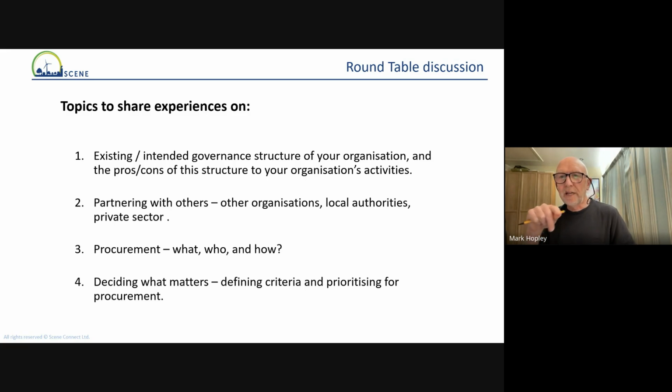There is a common denominator about the importance of doing due diligence on using contractors, even on small scale projects like community buildings, village halls, golf clubs, etc. Because there is a pattern of some of those people going out of business, and then the community organisations being left high and dry. So the people that I visited have said that next time round they'd be quite careful. They've chosen to use local, in line with their values, but they said they would do a lot more due diligence.